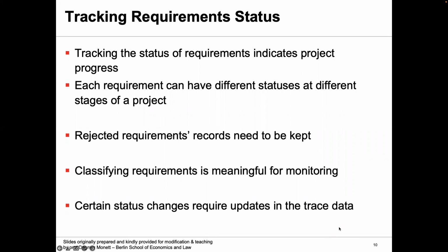This is what we discussed in the last slide as well, that tracking the status of the requirements indicates the project progress, right? There's this very common 90% done syndrome, they mention it in your book as well. A very optimistic software developer can say, oh, I'm 90% done with this, but in reality, there's a lot yet to be done. So incorporating the tracking of requirements through a status attached to it is a really good way of managing the requirements.